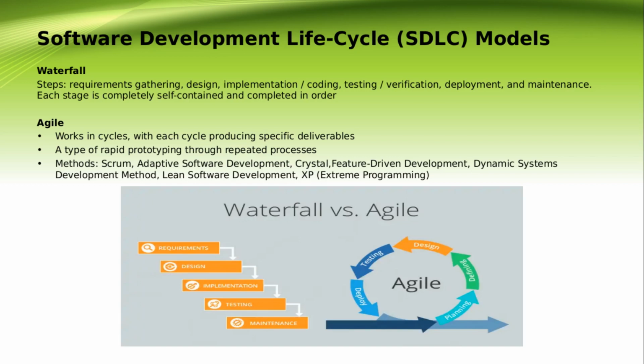Each individual phase is completed before the next phase starts, because the outcome of each phase acts as an input for the next phase. If the first phase gets behind schedule, the entire project ends up behind. Additionally, when a phase is completed, there is no going back to make adjustments. Changes cannot be made until the software is in the maintenance phase. This model should not be chosen for a long, ongoing project or when flexibility is a primary requirement.